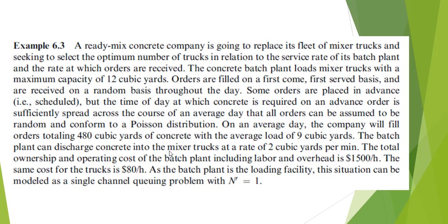And there's some other information. Some orders are placed in advance or scheduled, but those don't affect your overall rate because they're spread out during the day. So you can really assume that all your arrivals are random, and in that case you can use your Poisson distribution. That's what the Poisson distribution assumes.